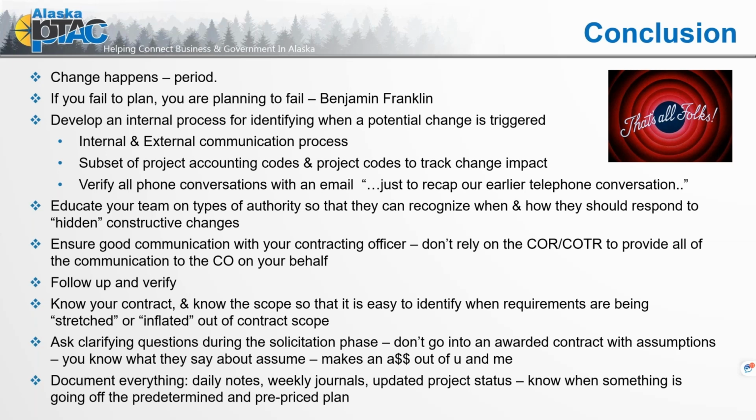Verify all phone conversations with an email. For example, this email is just to recap our earlier telephone conversation. I understood that you requested this. Is this correct? Get that confirmation in writing. Educate your team on types of authority so they can recognize when and how they should respond to those hidden constructive changes.